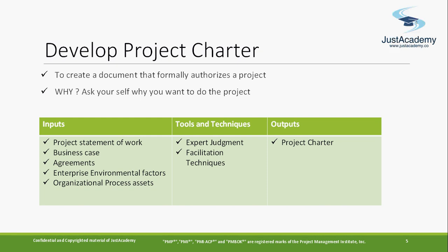So finally, that project charter will be ready, and the business sponsor hands it over to the project manager. Developing a project charter is not the responsibility of a project manager. It is the responsibility of the project sponsor, business sponsor, or the user for whom you are going to do the project. This is one of the activities done by the project sponsor or business sponsor, and then they have a final project charter ready. As soon as they hand this over to the project manager, that is where the work starts.